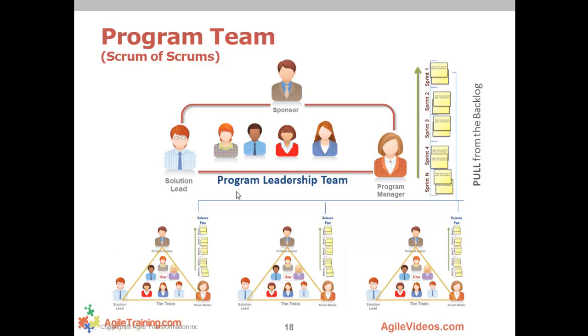This team's really looking at the dependencies between these teams, integration points, when should all this work come together to be integrated. So they're really managing the program. They're looking at a lot of these measurements. The burn-up charts are more at the program level. How's the program doing in terms of how many points have been delivered, right?